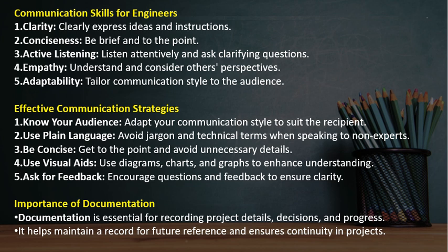How do I know the problem was because of this time? You have to look at the records. Who approved what? Who said what in what meeting? Got it? So, you have to maintain the record of everything you are doing: your presentations, your meetings, your reports. And the record will also help you in future work.